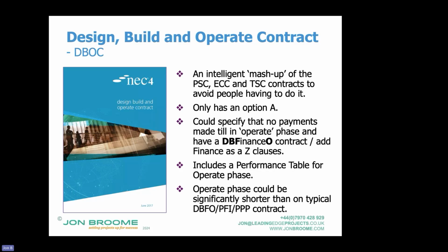And I put this last comment in here. The operate phase could be significantly shorter than a typical design, build, finance, PFI, PPP contract. Typically on the ones used in the UK, it was 20, 25 years. On the continent, apparently, it's quite common for there to be 5 years.